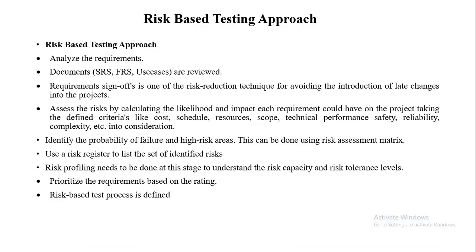So next we'll see what the risk-based testing approach is. Okay, we have already seen what risk-based testing is, so how actually this approach works. For the risk-based testing approach, we need to analyze the requirements first, and then prepare the initial documents. SRS and FRS should be reviewed, and then requirement sign-off should be there, which is one of the very efficient risk reduction techniques for avoiding the introduction of late changes.